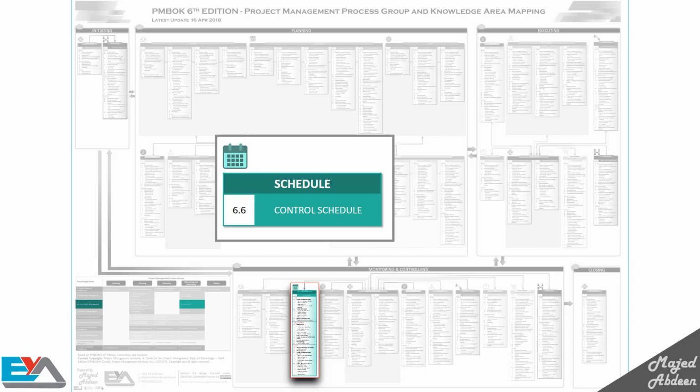Calculating the earned value makes it easy for you to know what you need to do with the resources you have. For example, imagine the performance of the team doesn't fit the original plan. In this case, you can decide to bring more people or to compress the schedule and accelerate the performance by doing more than one task at once. We call these concepts fast tracking and crashing.